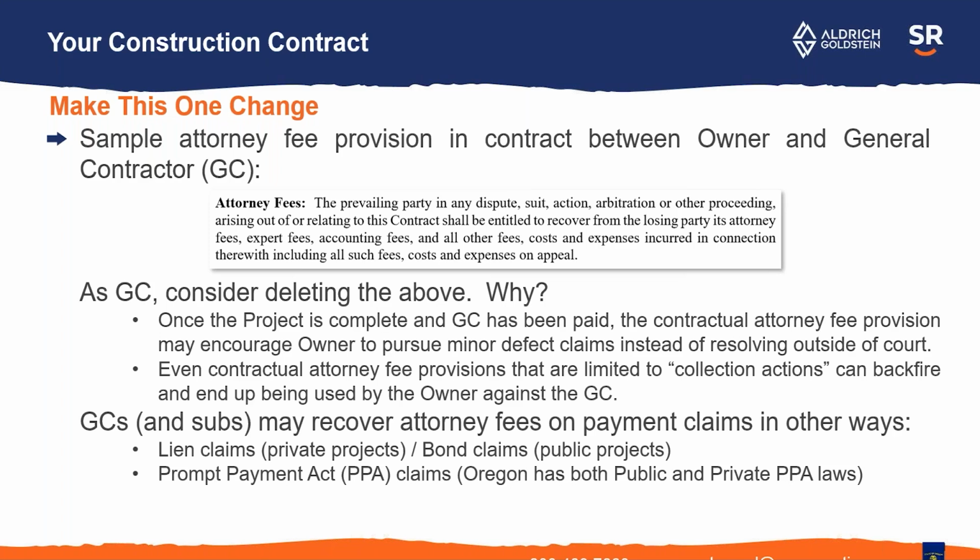The reason that I say consider deleting it is that after the project is over and everybody has been paid, that clause is more likely to benefit the owner because they may pursue a defect claim with the idea that they can get their fees back instead of just trying to work it out informally. So really, my experience is that the attorney fee provision after the project is over, after you've been paid, really just benefits the owner more. So consider striking that. A lot of design professionals are already doing that. Architects and engineers do not like those clauses for the same reasons. So something to think about.